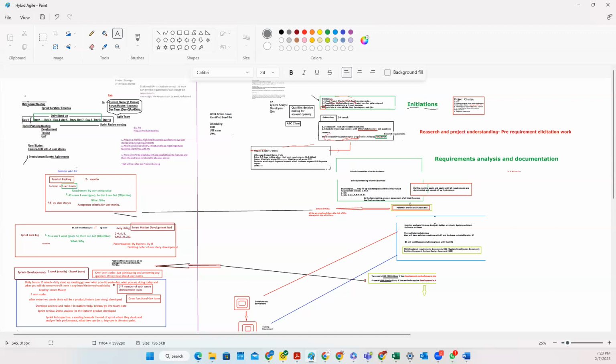That's the refinement meeting. First you and the product owner will meet and work on creating the user stories and building the backlog. Then that user story will be discussed with the development team, where you will have a developer, QA, architects, and everybody. They will ask questions, and based on that, sometimes another user story might be created, because the technical user stories will be created in the refinement meeting.